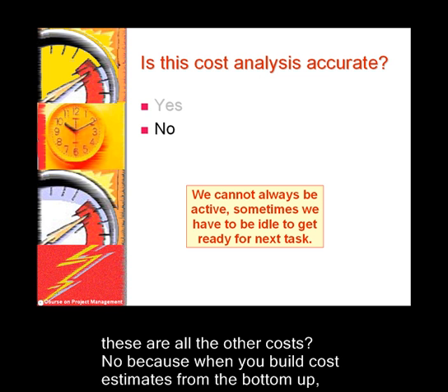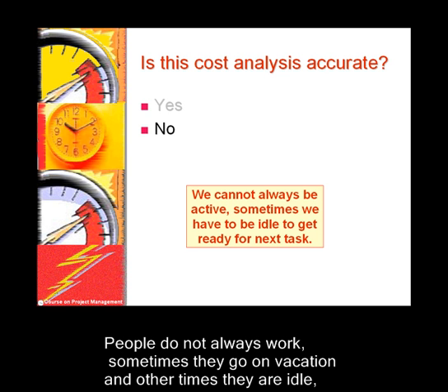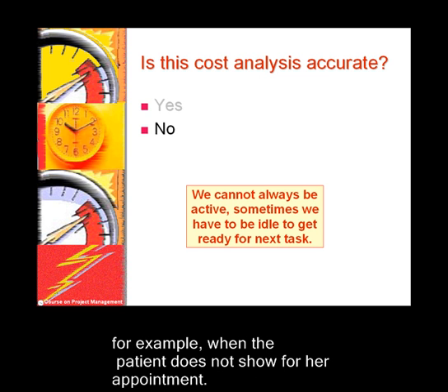No, because when you build cost estimates from the bottom up, you almost always ignore the costs that are not associated with any activity per se. People do not always work. Sometimes they go on vacation, and other times they are idle, for example, when the patient does not show for her appointment.